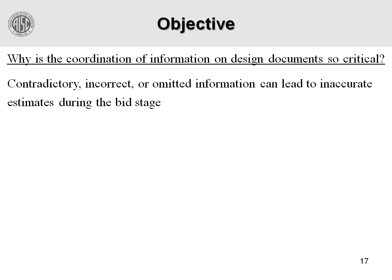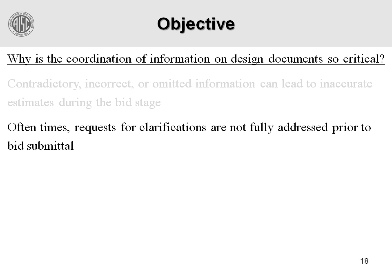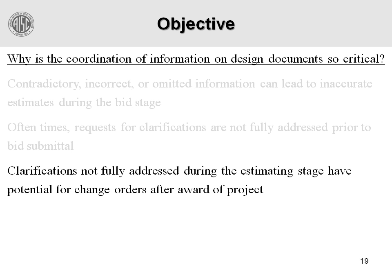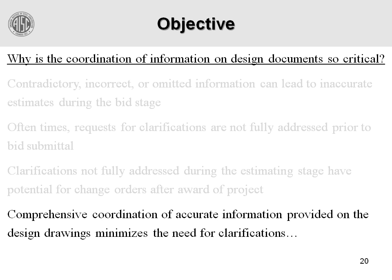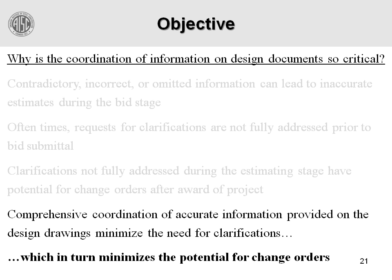The next question: why is coordination of the information on the design document so critical? Contradictory, incorrect, or omitted information can lead to inaccurate estimates during the bid stage, and requests for clarifications that aren't fully addressed prior to the bid being submitted. Any clarification not fully addressed during the estimating stage has the potential for change orders after the award of the project. A comprehensive coordination of accurate information on the design drawings minimizes the need for clarifications, which in turn minimizes the potential for change orders.